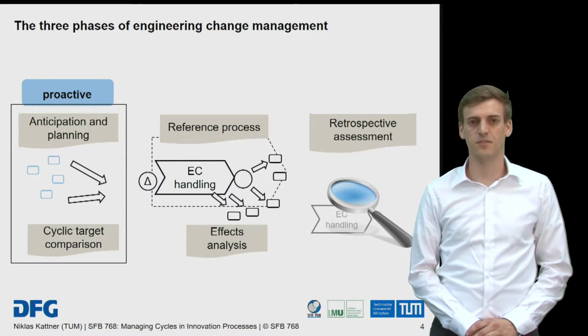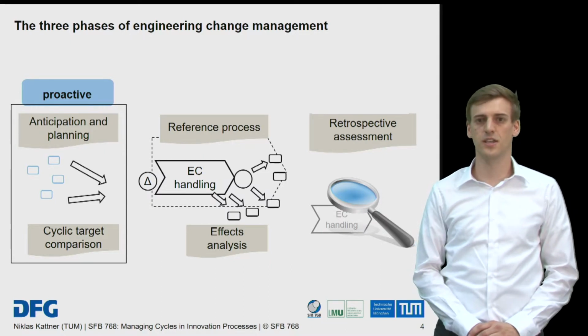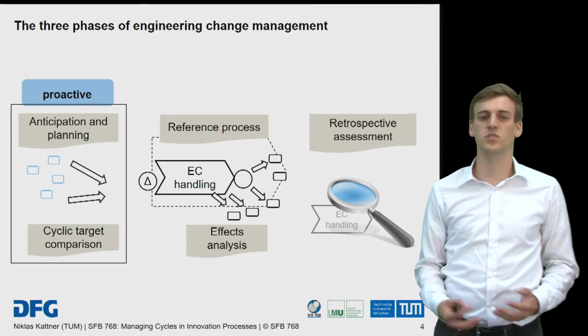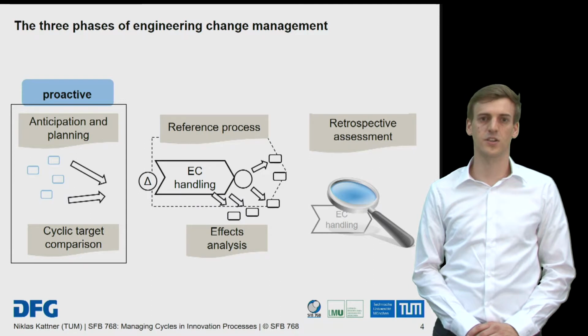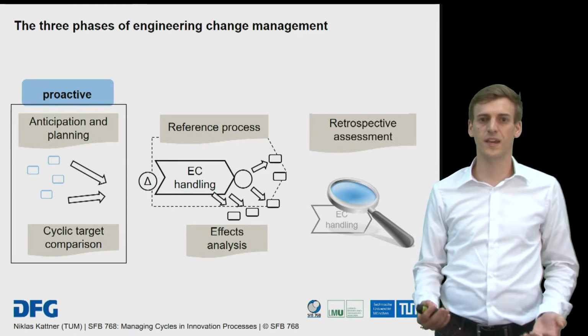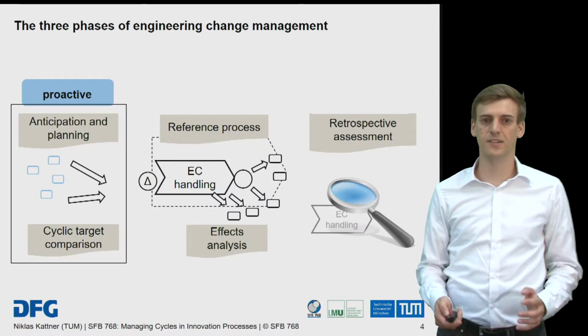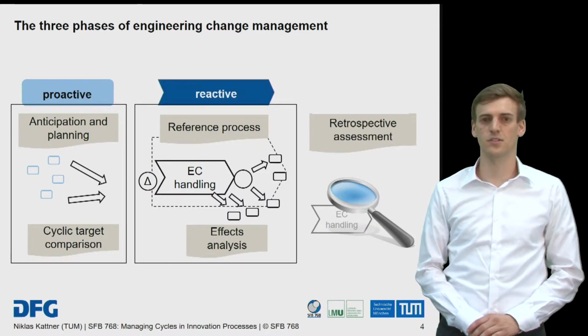The second phase addresses the actual handling of engineering change. Therefore, a process guiding through the steps necessary to successfully implement the engineering changes is defined. This includes an effect analysis to reveal possible change propagation. We call the second phase the reactive change management.